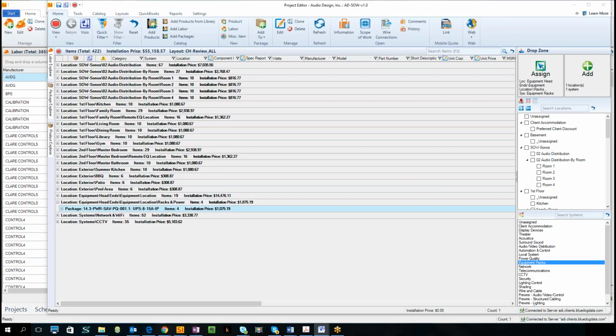Yeah, so that's all there is to it. You can do the same thing with an equipment price adjustment, but like I say, normally there's tax and miscellaneous costs and other variables that start to come into play when it's an equipment item, and it makes hitting this round number more difficult. So if you do it with a labor price item, it usually is just the number is what it is. Penny for penny, yeah.